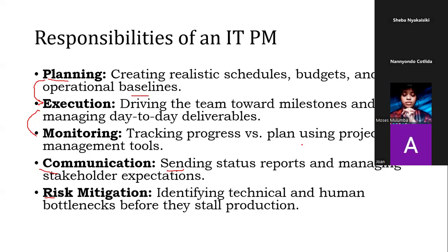for example, the example I'm using, ZVAST, you may find that it is a platform that actually has a number of things. It's dealing with the finances, and the results are there together. It's one platform, but it is integrated with, or co-hosting, many other systems. So if you're developing a new system, you may fail to integrate these other systems to work the same way the existing system does.